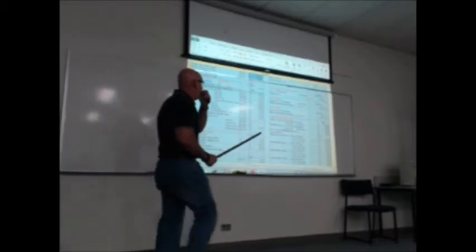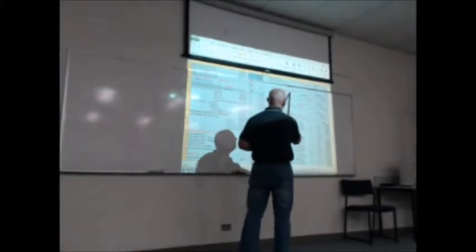So you didn't give your window fit-out to your window manufacturer? Yeah, almost. But I could get a rough price when I was working out me costing. So pretty much for this job, we're going to end up with job lot prices for the windows, for the roof tiling, and for the truss system, and everything else will be pretty much worked off. So you're saying that's the one you've got to estimate?